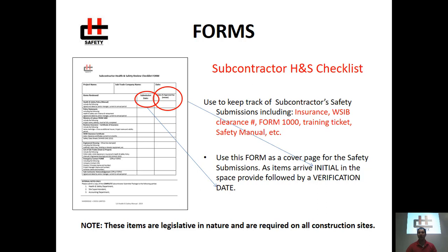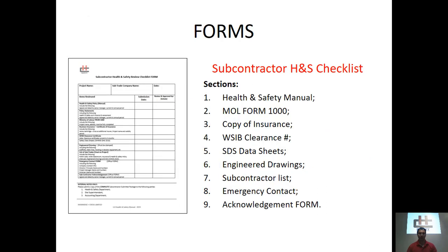As items arrive, it is a responsibility of the project manager to input their initials and the submission date that it's been received. Only submit the completed subcontractor package once all the information has been received. These items are legislative in nature and are required on all construction sites. The subcontractor health and safety checklist includes the following sections.